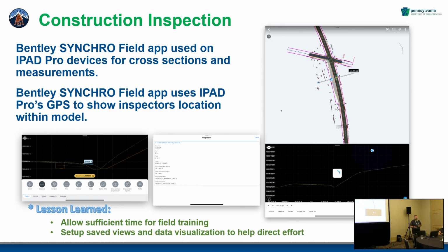One of our inspectors actually took 5 hours typing into a spreadsheet to get that information to take out with him on the project because he didn't know how to get it out of the software. There wasn't the ability. After we heard that, we said, did you think to ask design if they could have given you that data in an easier way? Which we could have. With OpenRoads, we could have simply printed a report. Here you go, here's the cross-section information.